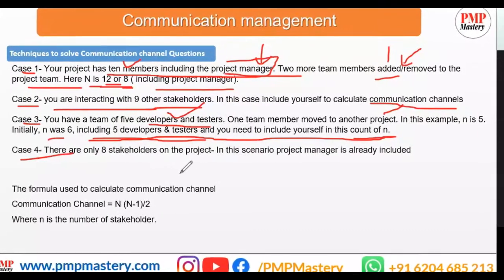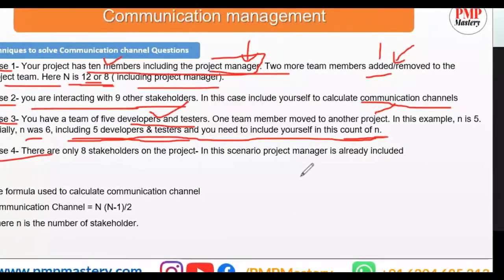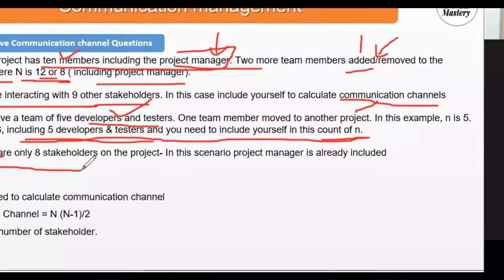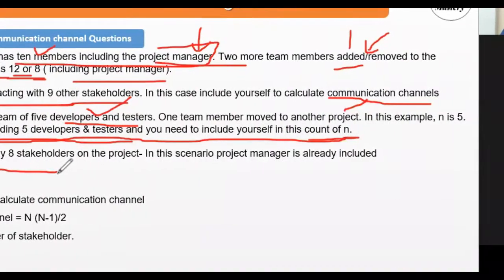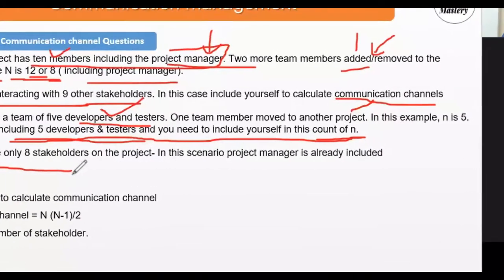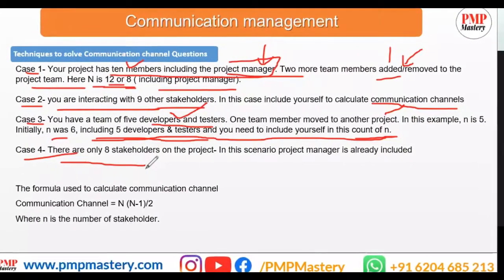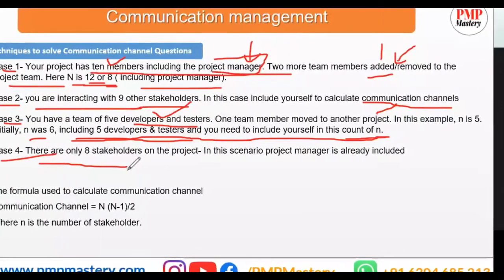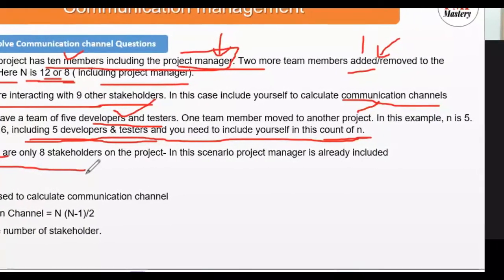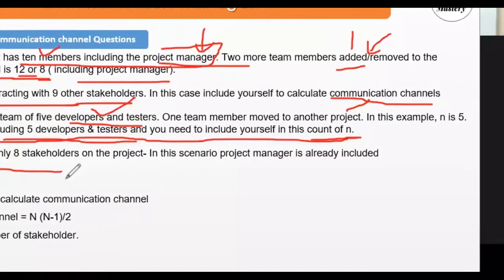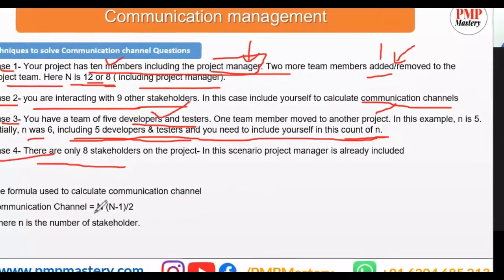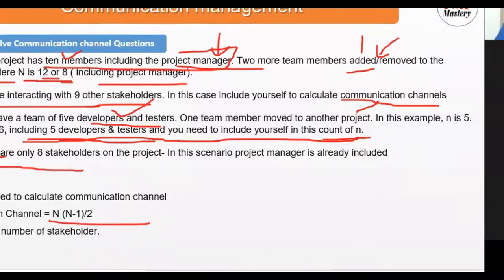Case four: there are only eight stakeholders on the project. In this scenario the project manager is already included in that count, so you do not add one more for the project manager. Keep these cases in mind when reading communication channel questions. The formula is n(n−1)/2, where n is the total number of stakeholders.